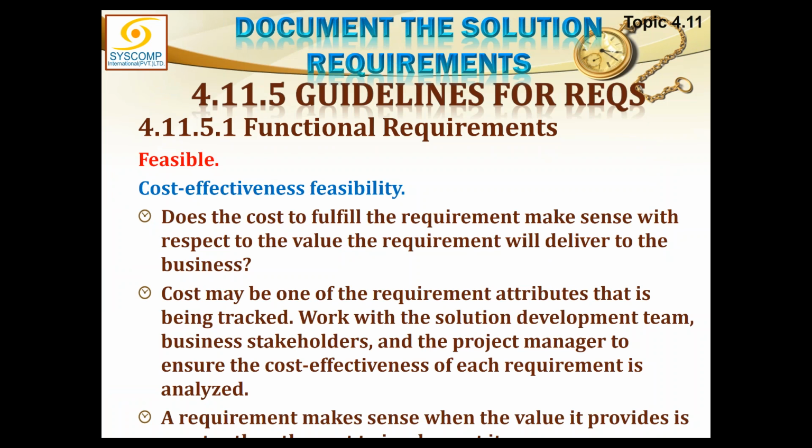Always consider here the requirement, not the whole solution. Is this requirement cost effective? Cost may be one of the requirement attributes. There could be many other things, time, operational, technical, a lot of things you are checking. So here we are only concerned about cost. Is this requirement cost effective? Work with the solution development team, business stakeholders and the project manager to ensure the cost effectiveness of each requirement is analyzed. A requirement makes sense when the value it provides is greater than the cost to implement it.